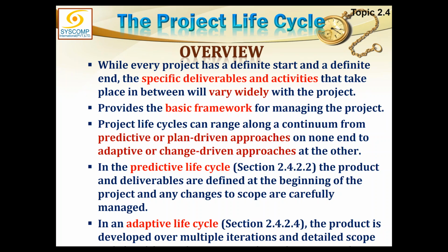The interesting thing about Agile is that unlike traditional project management, the size of each iteration or phase is fixed. It is either 2 weeks, 3, 4, or up to 6 weeks, but whatever size you select, that is fixed. You can't change it. Whereas in normal project management, we do not size our phases by their duration, but by their deliverable.